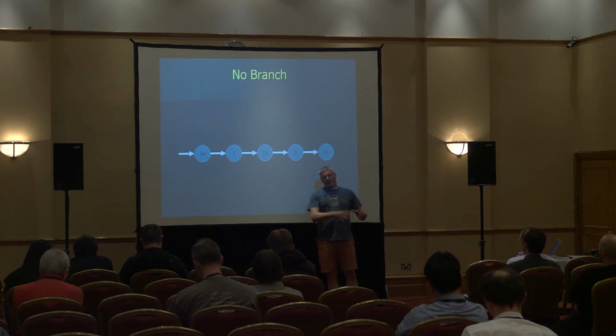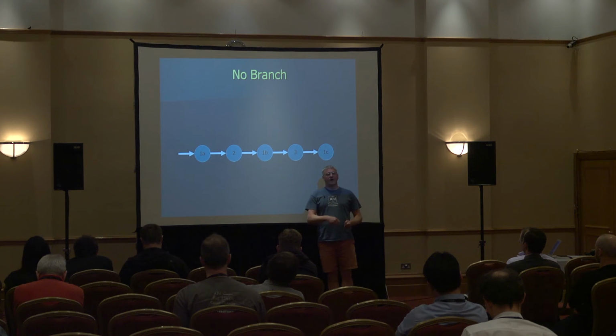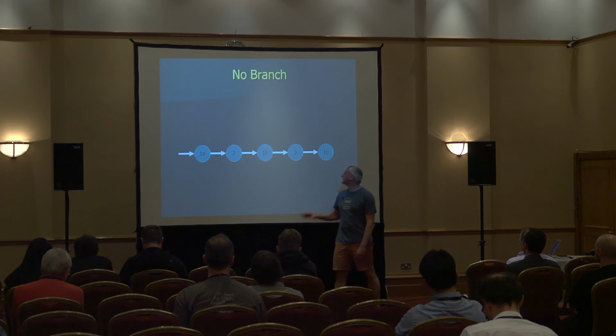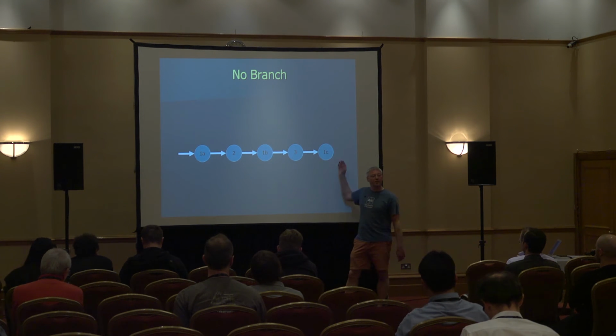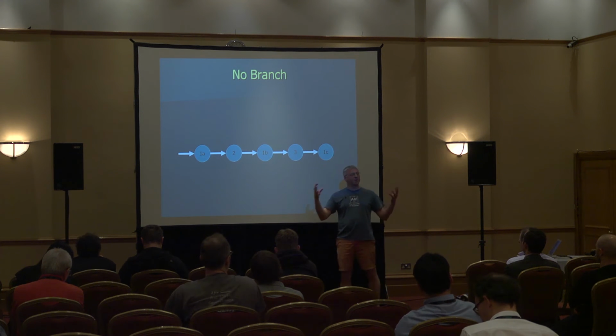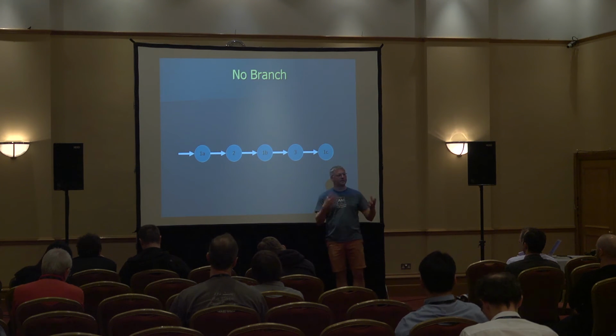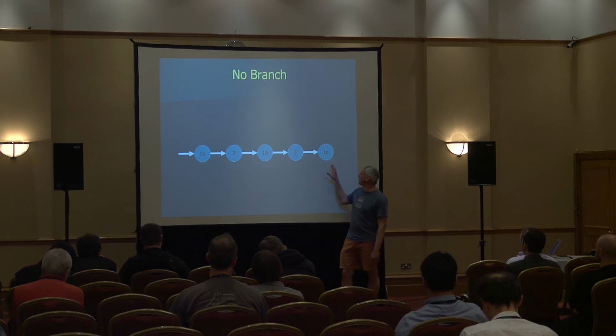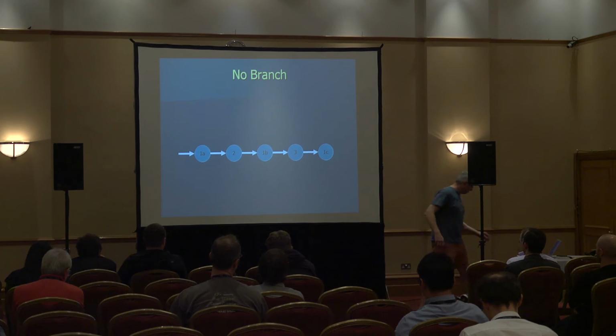So your product backlog, when that feature's delivered, you still need a task on that backlog to go around and unwind the stuff, throw away the dead code, unwind any switches that you've added and clean up after yourself. So even though you're here, there's still other work that needs to be folded in, because otherwise you're just going to accrete more and more dead code and add to complexity. So there has to be a lot of cleanliness and hygiene stuff that goes around that. I will learn in a minute not to triple that.